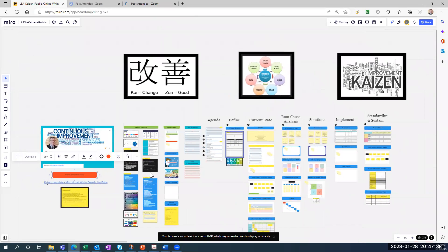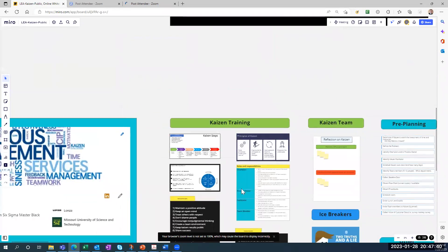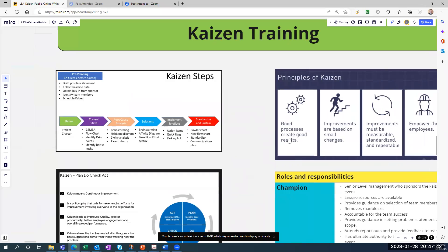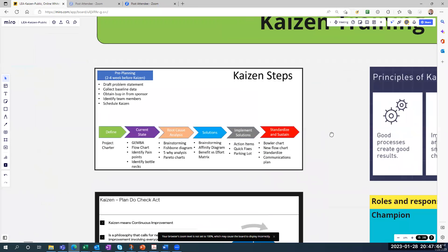Let me start with this first slide and talk about the Kaizen steps. Before you do a Kaizen, you want to have pre-planning about two to four weeks before the event. You want to draft the problem statement with the sponsor, collect baseline data, obtain buy-in from the sponsor, identify team members, schedule the Kaizen, and start drafting the project charter.